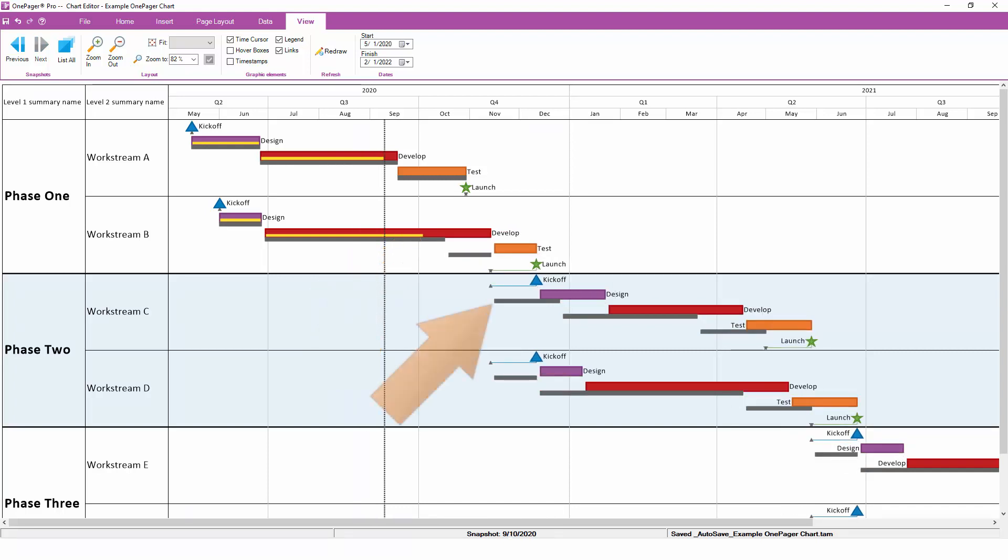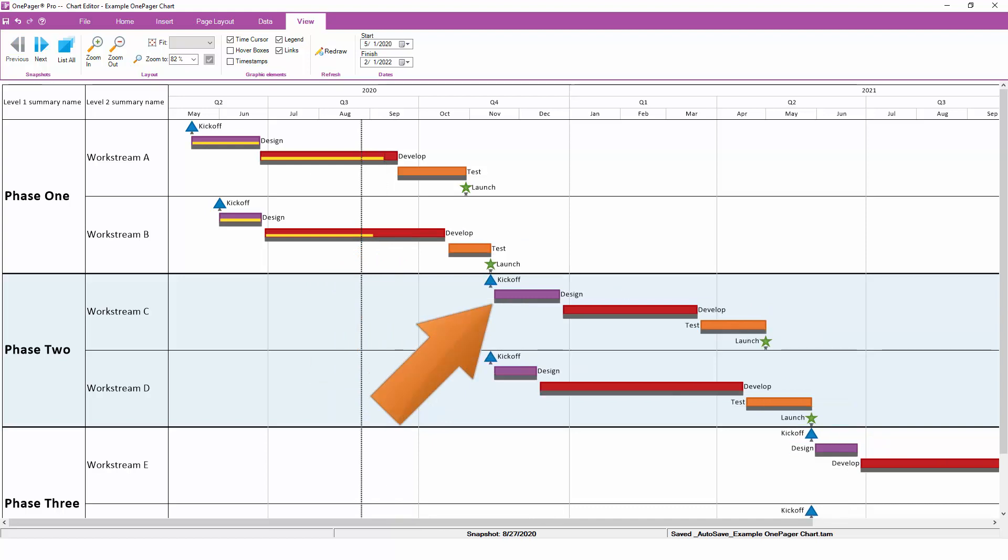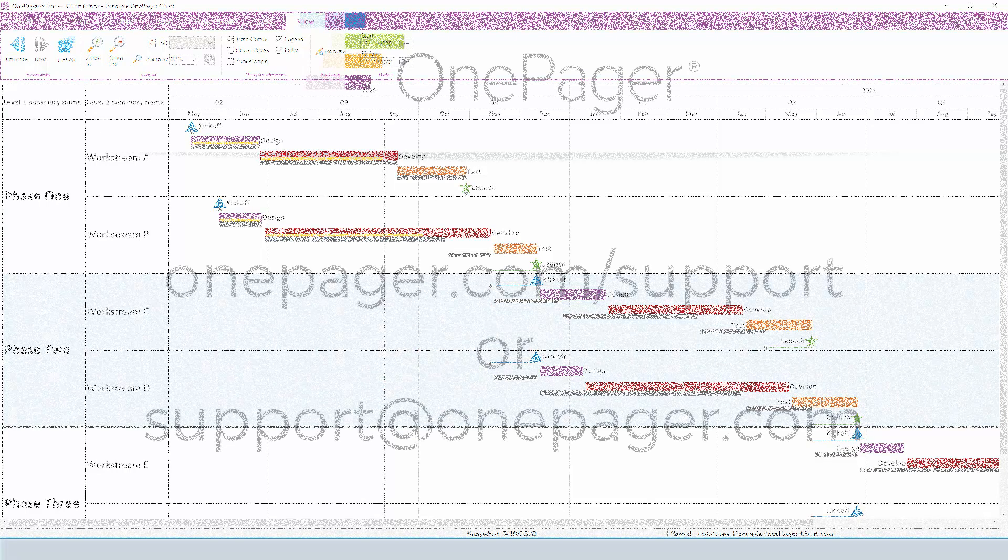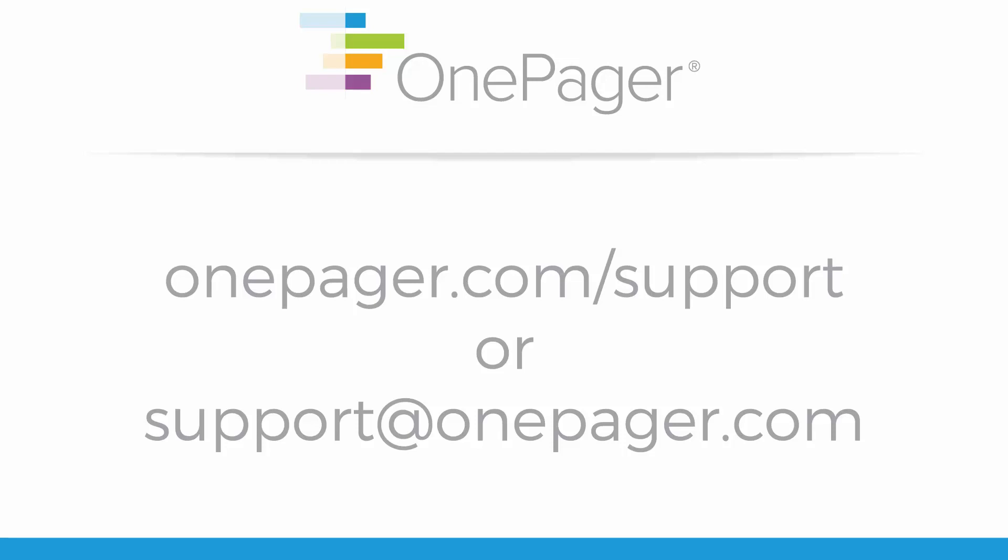The baselines, if you're tracking them in project, don't move. They stay put, which gives you a good sense for your original plan compared to the current state of the project.